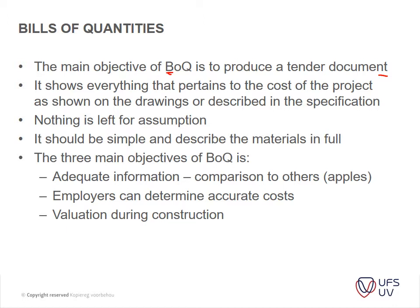It usually starts with your preliminaries and general, then earthworks, then concrete, masonry, waterproofing, roof coverings, structural steel, carpentry and joinery, etc. So it basically divides your project into different trades to assist in the procurement process. It tries to follow the logical flow of the project and the different contractors that you need to actually produce the construction project.